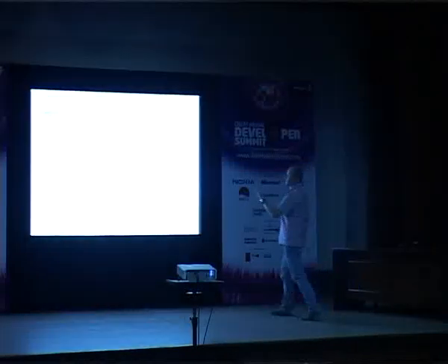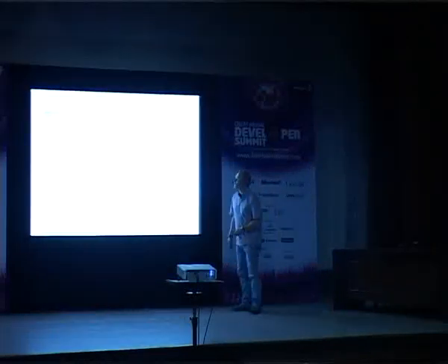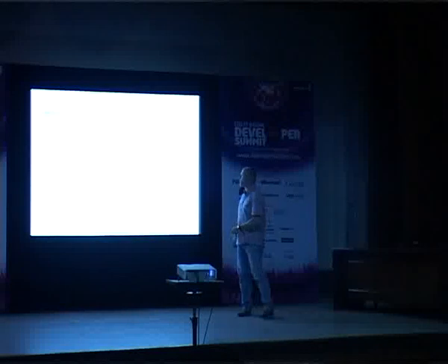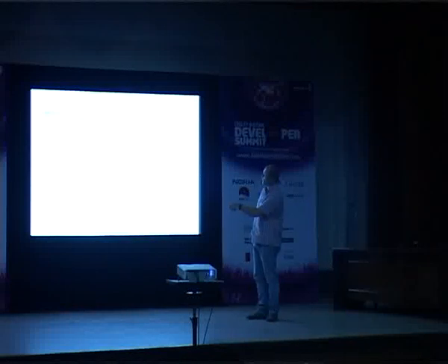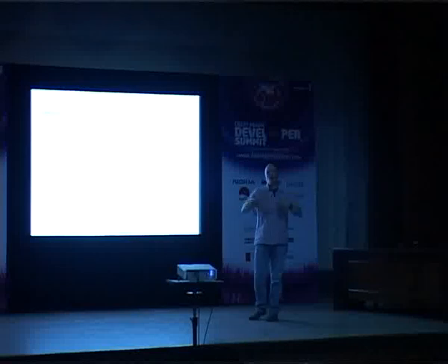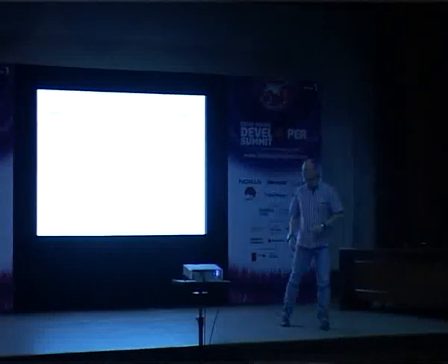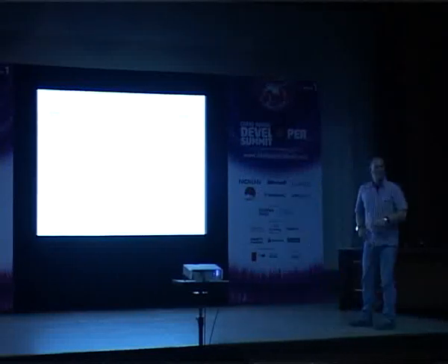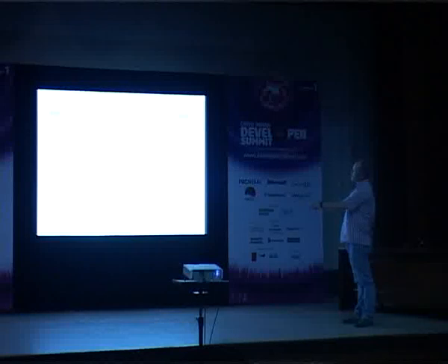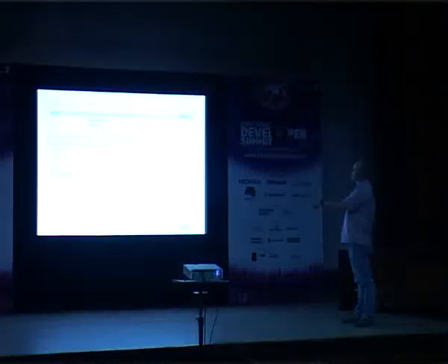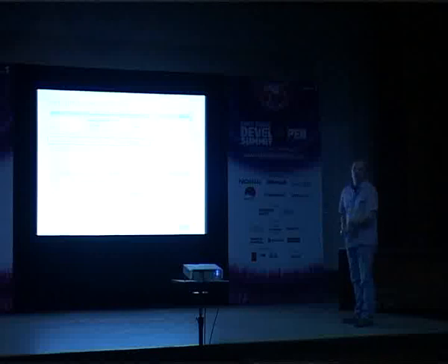I'll show you some. These are in Dutch, but I have an English example as well. User stories usually have the form: as a someone, I want to do this or that, so that I can achieve whatever I want. So in this particular example, I hope it's readable in the back, probably not: as a non-administrative user, I can modify my own schedules, but not the schedules of other users.